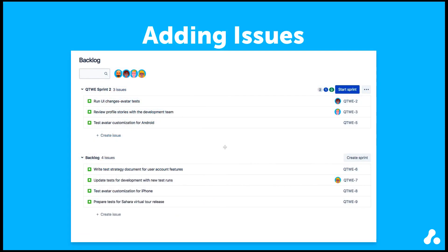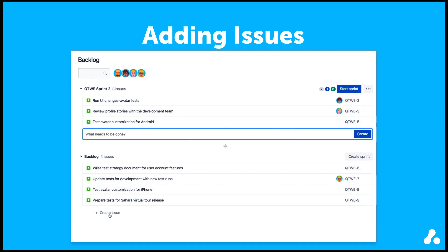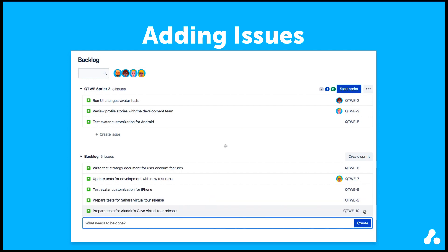To add an item to your backlog, under the Backlog section, click Create Issue. In the What Needs to be Done field, type the title of your task and then click Create, and the issue appears. When you build your backlog, remember that you can add stories in here and later take the time to groom the backlog and break down or remove stories. This is the long list you need to pull from to plan your team's work and build your sprints.